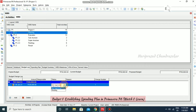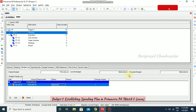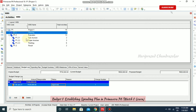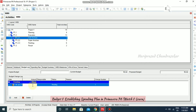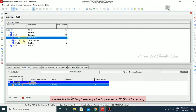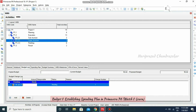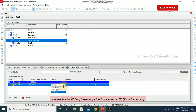For example, if I put Approved — with one lakh additional approved — the budget increases by 1 lakh. That is how you use the Budget Change Log. For Substructure, if there are additional expenses of 50,000, I will put that as Pending — proposed budget shows 50,000. For Superstructure, I will put another 50,000 and set it to Not Approved, so it shows zero.